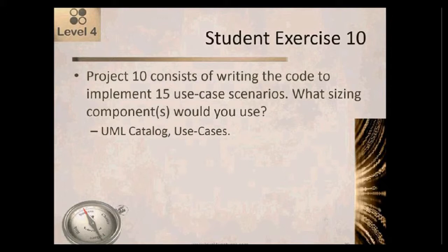It's a trick question. But it's an important thing, because if somebody came to you and said, we want you to estimate this, and we've got 1,400 stories, why would you want to do all the work to understand those stories and turn them into things like reports and pages and so on, when they've already told you they've got this many stories? So use the Agile. If somebody's got use cases, then use the use cases.